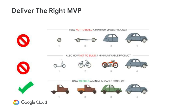Size the scope of your API project right and focus on the minimum viable product. Ask your team: what is the least we need to build that will still deliver business value? The picture here shows three different ways to build a transport device over four releases, with the business goal of getting from point A to point B.